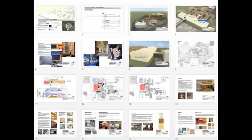We use a lot of imagery in a document here to display, we're looking at terracotta and masonry and Pilkington glass systems. We ultimately went down, and for all major spaces in the hospital, we gave them a pretty detailed description of where we were going to use terrazzo versus sheet rubber, which is more expensive than sheet vinyl. And we defined a lot of the quality of the components of the project. We let them know at that point, we're going to be using stainless steel brick ties and things like that. We're going to be using solid surface countertops everywhere. And again, we found that the budget that was developed in 2007 has actually reduced through SDs, DDs, and construction.